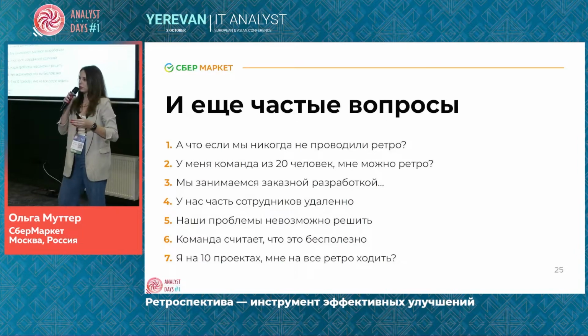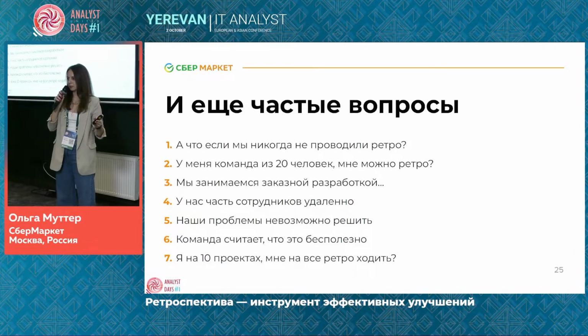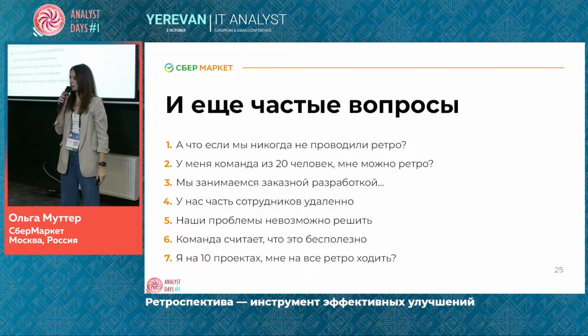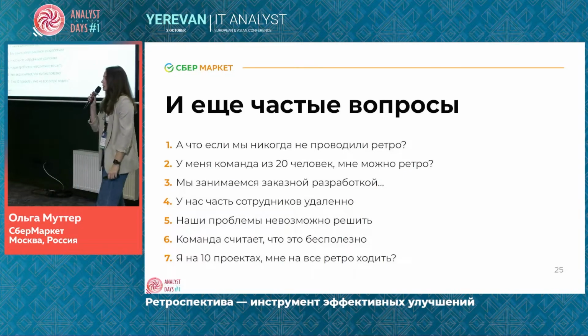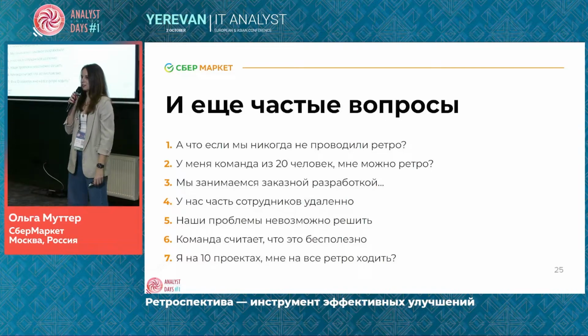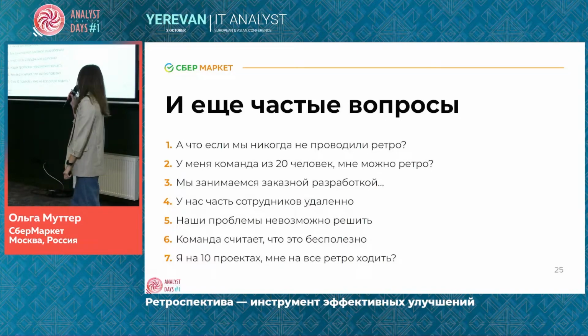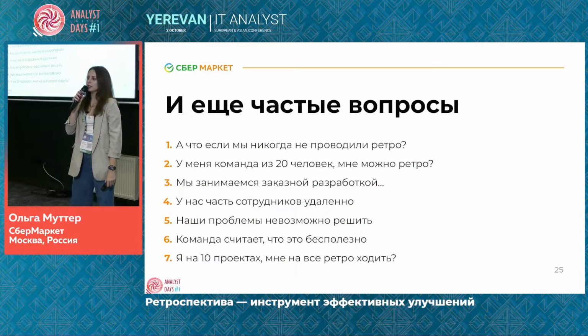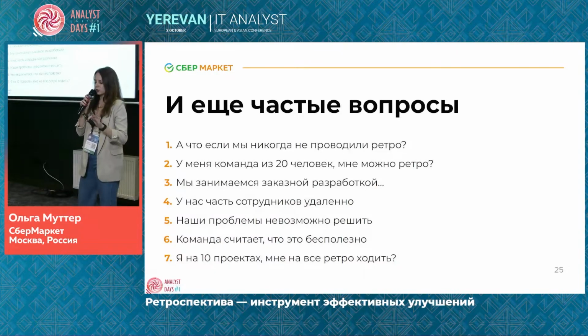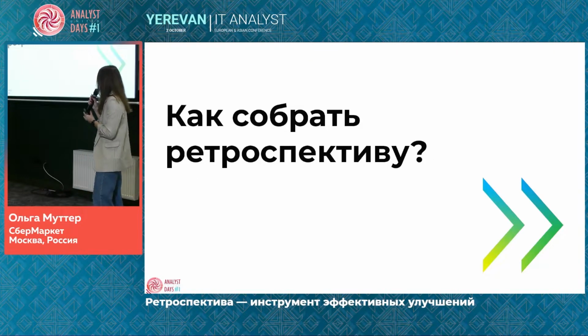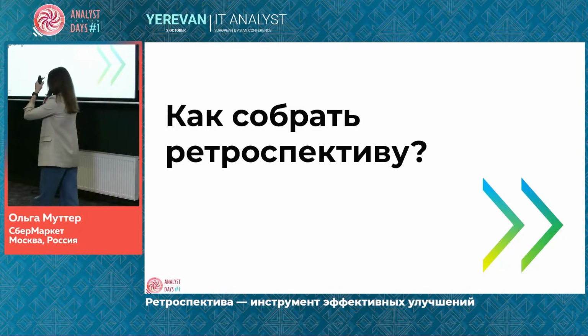If you're working in the customized development or working on a product, you can be involved in different projects. I'm in a dozen projects. What should I do? Of course, it's up to you to decide whether you attend all 10 retrospectives or not, but more frequently than not, my principle is that at the project where you spend less than 30% of your time, you will be just a listener at this retrospective. But retrospective implies that everybody's an active user. There shouldn't be any passive listeners there.